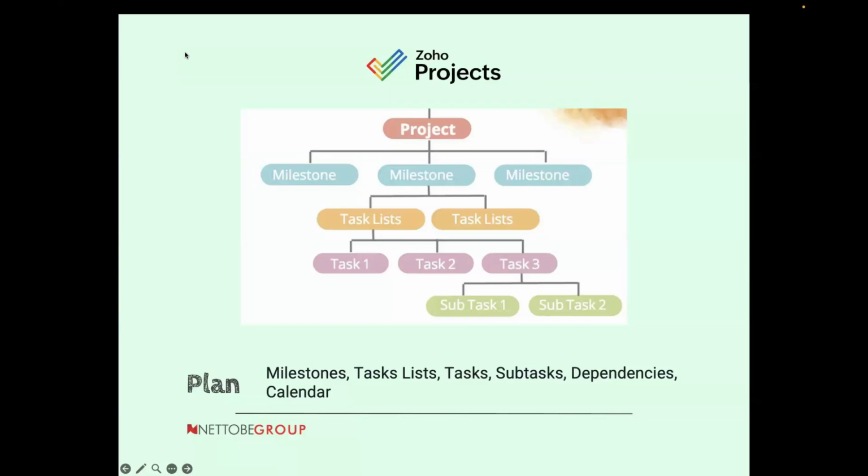If it's beyond 3 working days, it's advisable that you break it down into subtasks, the reason being that it's easier to catch issues or problems that could create delays or risks if they are broken down further, if they are beyond 3 days.